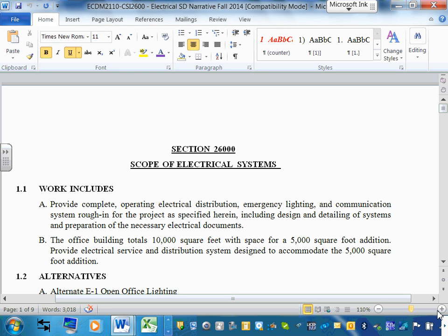Yes, this is a guideline scope, they call it. A scope or narrative, the terms that they use for it, project scope, project narrative. The way they come up with this, typically the engineers, senior engineers in the company, they do business like Halberg does a lot of schools. So they get together and they write a narrative like this about a typical school. What would a typical school have? How many receptacles, how many lights, where the switches, a typical. And that becomes their narrative for a school.